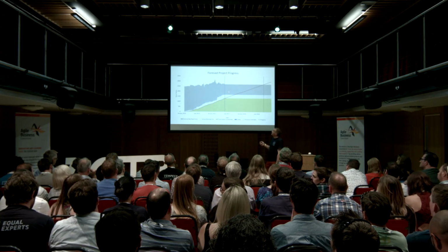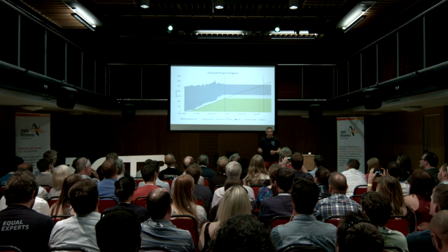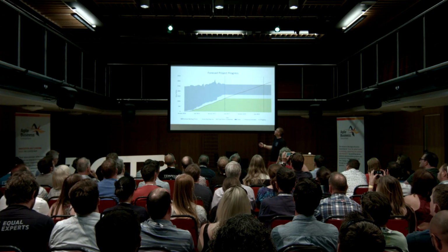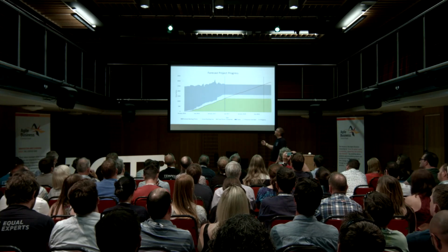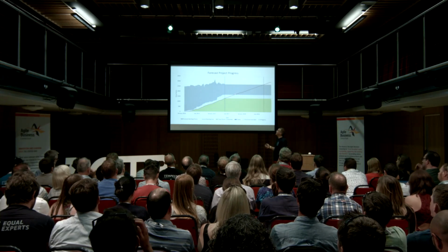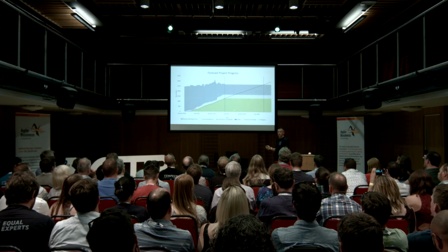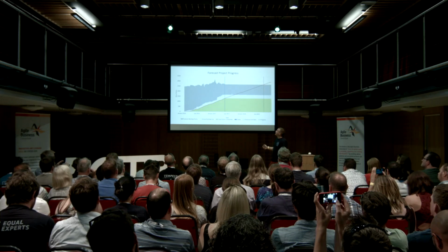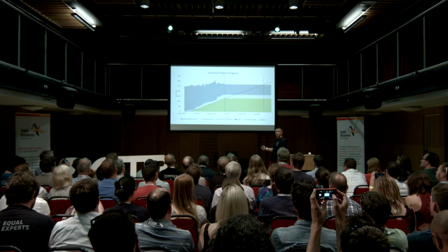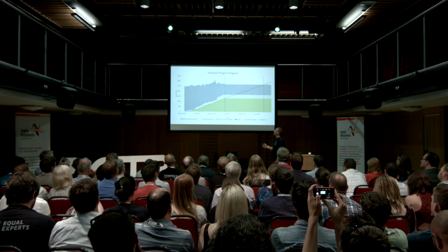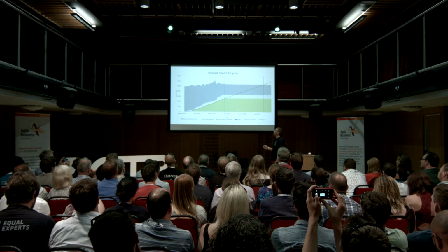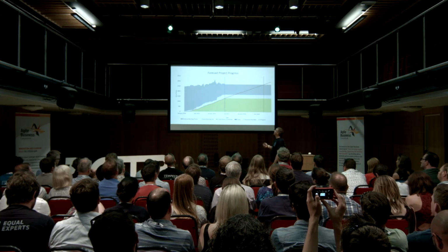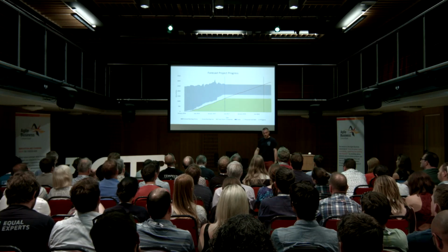What's nice about adding this extra forecasting logic in is that when you're predicting out using your velocity line, you can start to look at how it impacts your release date. So here, if we just had the work we've got in the backlog, we'd be able to say, well, we're probably going to be finishing everything in our backlog kind of August-y time.